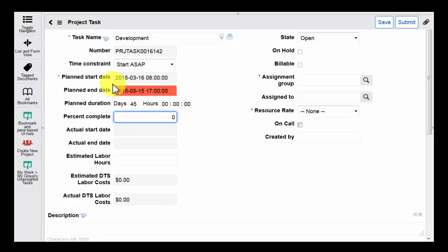It's important to note that ultimately all the tasks that you enter are what make up the project beginning and end date. So if you fill out the project form and you have a number of days there and then you end up making tasks that don't match that, or really as soon as you make tasks, they overwrite that information.